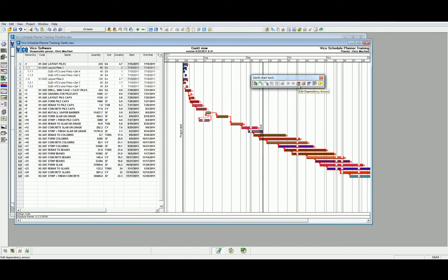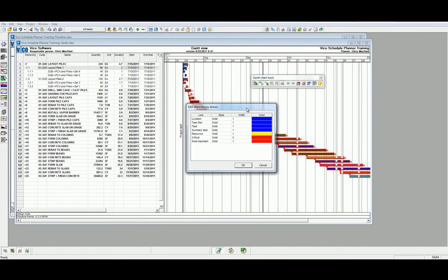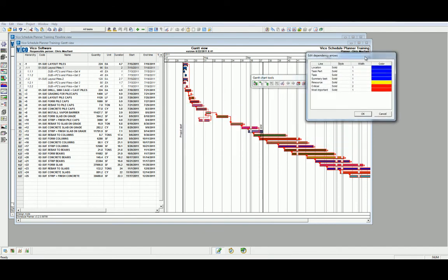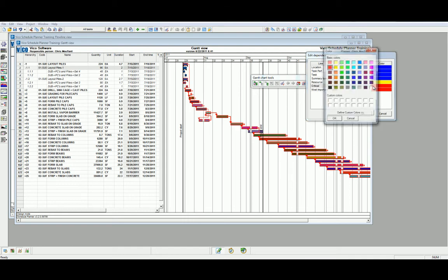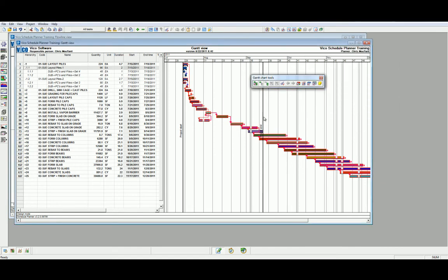With our tools, we can also edit the Dependency Arrows. The Dependency Arrows are the links that signify the logic relationships between each task. For the sake of the exercise, let's modify the Critical Dependency Links and use a different color. As you can see, the Critical Task Links that exist between each task have now turned into our new color.